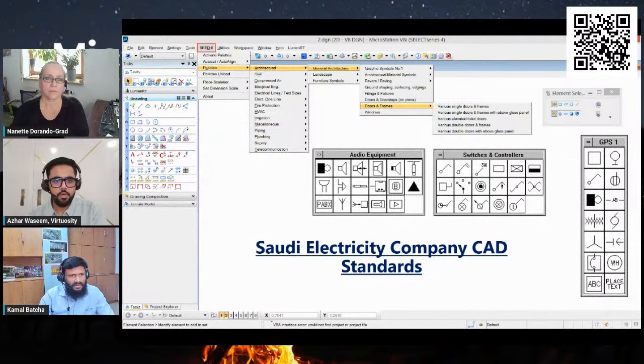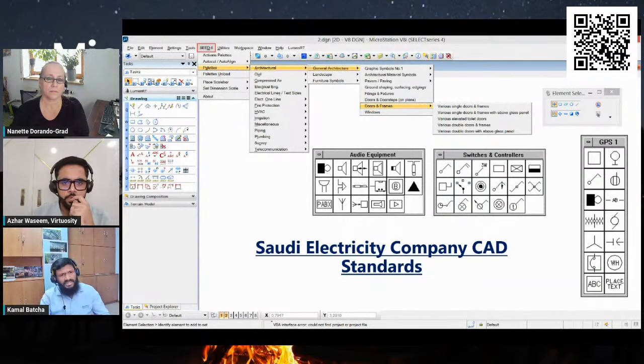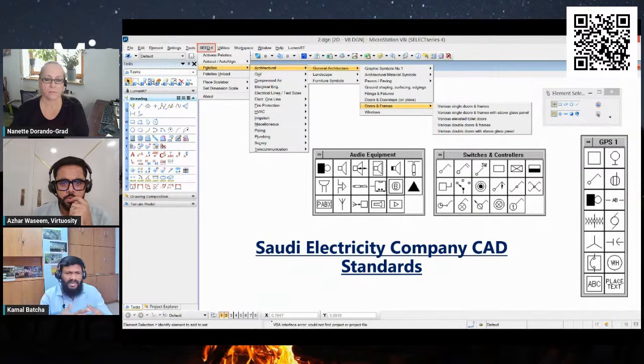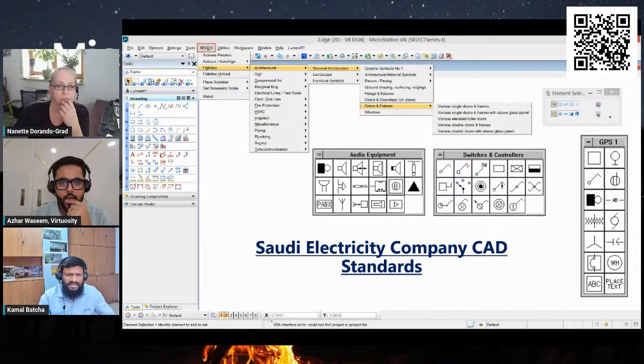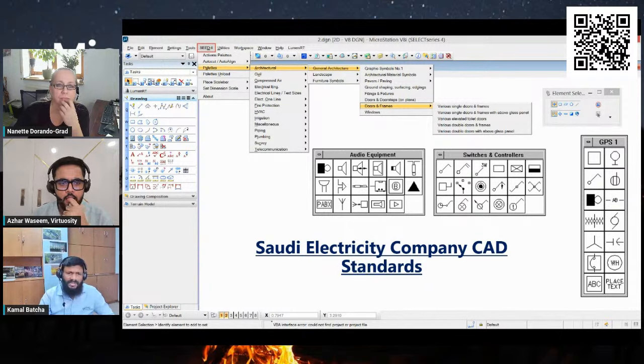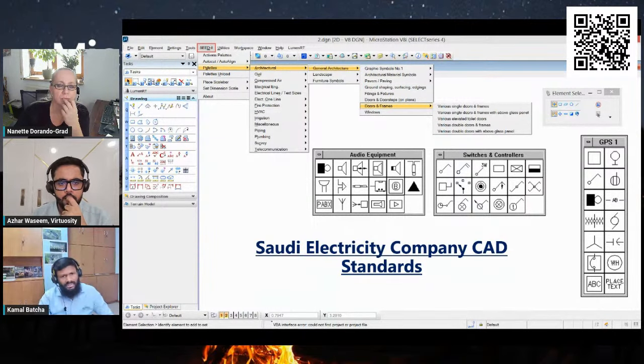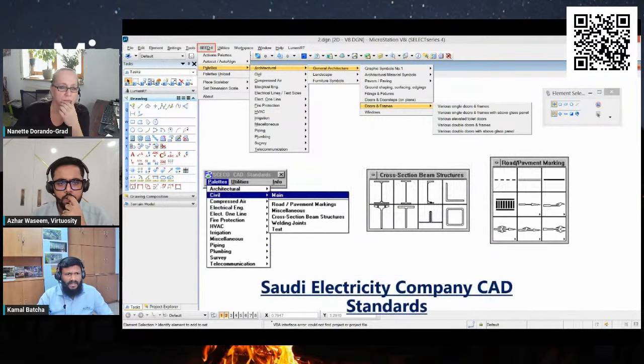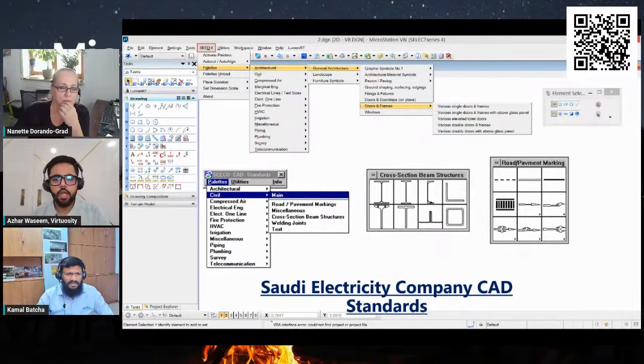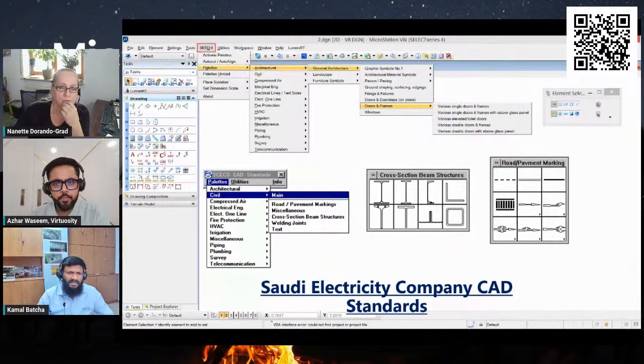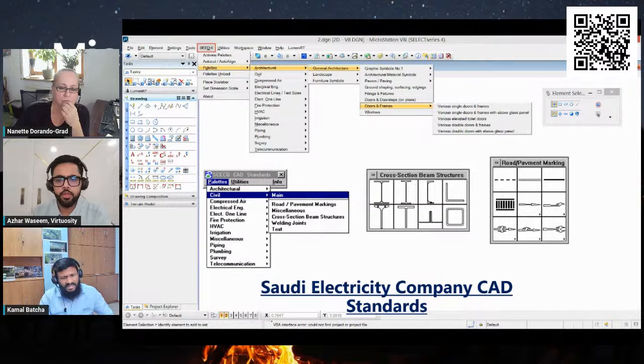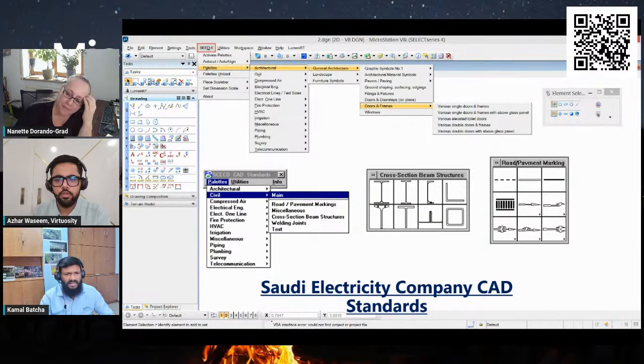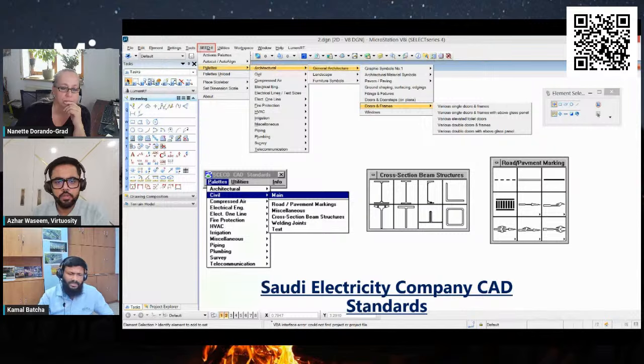And here I've extracted the symbology for electrical switch controls as well. There are separate border files for different disciplines—line elements, fonts, cell libraries, color tables. It is mandatory for every contractor to submit the drawings in the DGN file format and ensure compliance with the SEEDS 2 standards. Here I've extracted the symbology for civil structural and road pavement marking as well. These standards are designed to ensure the safety, reliability, and efficiency of electrical infrastructure and power generation and distribution systems in Saudi Arabia.